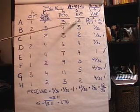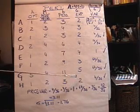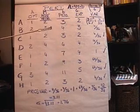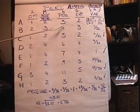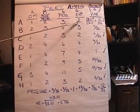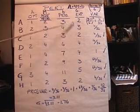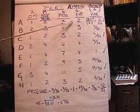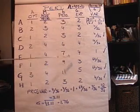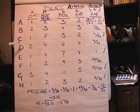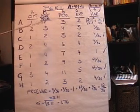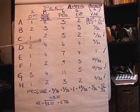Okay, the next step then is to use these expected times just like we did in the first video, and put it in a network diagram, figure out where the critical path is. Well it turns out the way I've got these numbers set up, the expected times are exactly the same as the times that we had in the first video. So this, from here on out, the problem is exactly the same, because we recall that we had A, C, E, G, and H were the critical path activities with an expected time of fifteen.